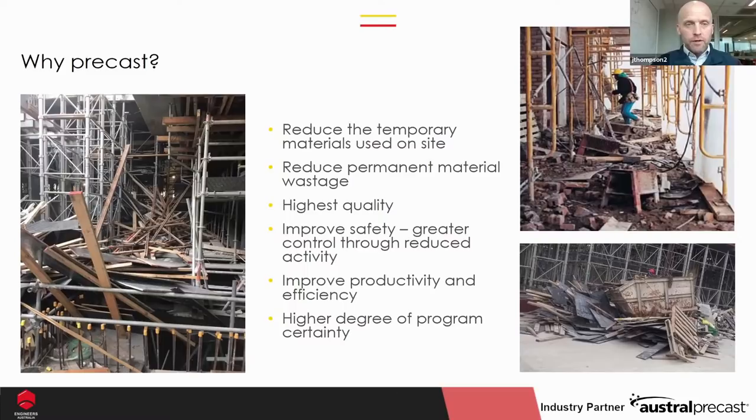We, particularly in reinforced concrete structures, use an inordinate amount of temporary materials to build the permanent structure. And when we do that, we have massive wastage of it. We have scenes like those, unfortunately. You're not looking at a scaffold collapse there, you're looking at what people think is a reasonable way of striking formwork. In addition to the wastage of temporary materials, of course, we've got the wastage of the permanent materials as well. You know, 3 to 5% of concrete wastage is not uncommon, probably similar with reinforcement as well.